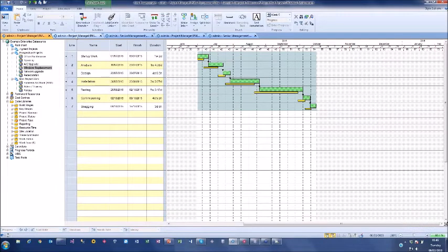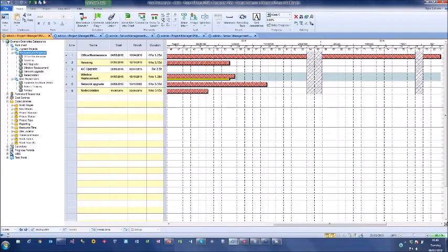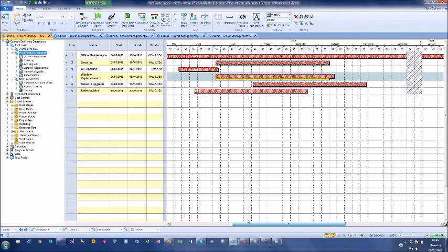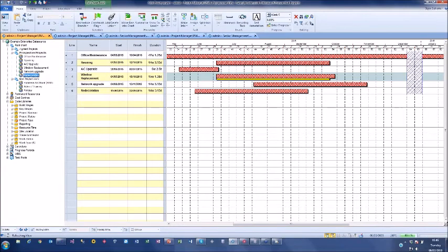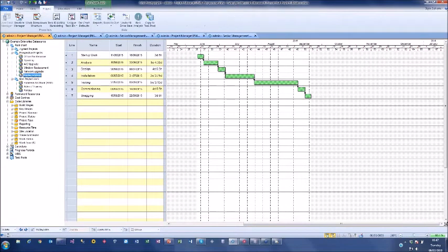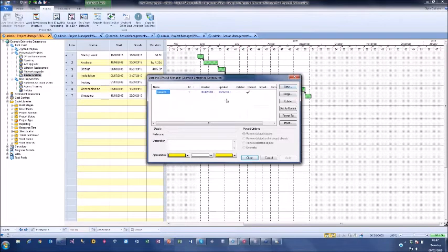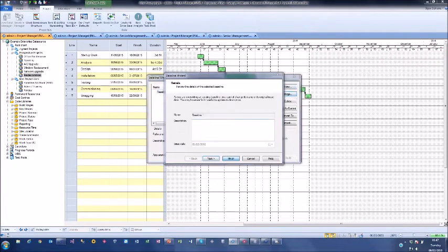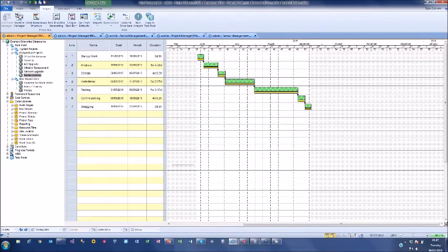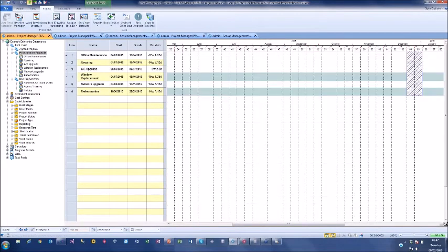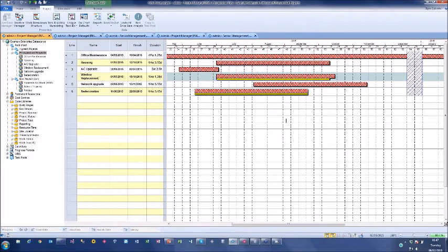very quickly. And then if I go at a later stage, you can see I've only got one project baselined. I can then go into other projects, and I can add them to the baseline as and when required. So you can have a baseline policy, so I can merge that in. So that one gets added, and when I step up a level, I can see that is added to the baseline, but the other projects haven't yet been because they may not have been agreed and signed off by the client. So I can have a copy of every project as it was agreed in the overall global baseline that can be used within the enterprise system.